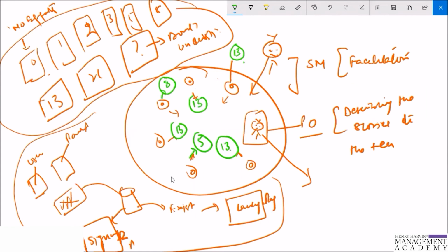So the first question you can ask, as a facilitator, the scrum master, either from this guy or this guy, is why he thinks that it is going to take 5 story points, and why the other people think that it is going to be much more, 13 story points' worth of work. I will explain the story point as a concept, but consider it as a number. And as the number moves toward the higher one, it means more effort is required to do the work.